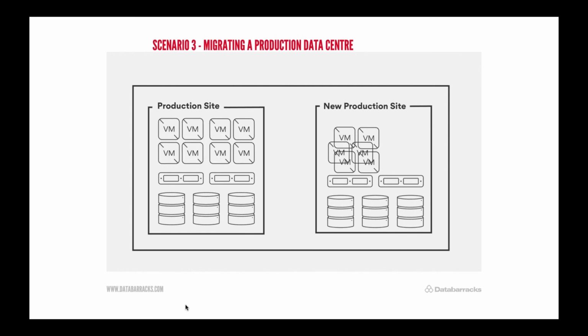Inevitably you'll have some services that are dependent on a number of items of infrastructure, and you need to bring all of those at one point. So there are some slightly larger migration pushes, but over time you can do it all in a much lower pressure situation.